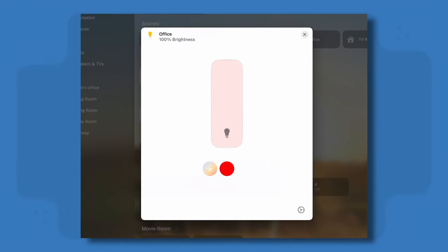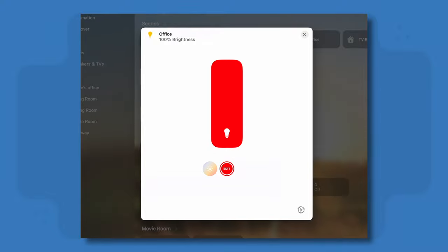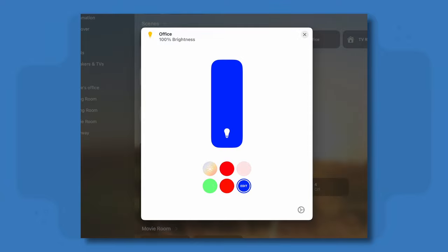Next up is the term feature. Most commonly, this means a product backlog item that is big enough it can be released to users. If you're building software to control the color of smart home lights, you probably wouldn't release a backlog item that let users set only the red value of the light. But letting users control the full color spectrum by setting red, green, and blue values is big enough to release — so that would be a feature. Feature is similar to epic, at least how epic was originally defined. Epic just tells us a story is big, but feature tells us it's big enough to be releasable.